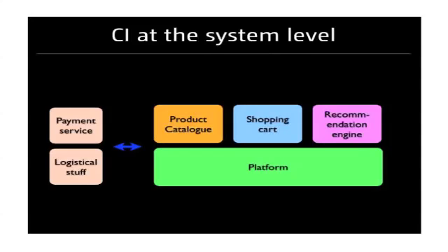Right. There is one thorn in the side of a lot of people, which is that they don't have control over their entire system, and often you have to integrate with things like payment services or CRM systems that do not follow continuous integration. And this is usually what makes it a 5-year problem, not a 1-year problem. Or if some of the parts of your system are not under your control, say the product catalog team is run by a separate division, and they're not interested in continuous integration or continuous delivery. That's normally what makes this really painful.